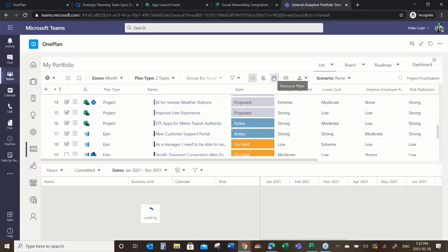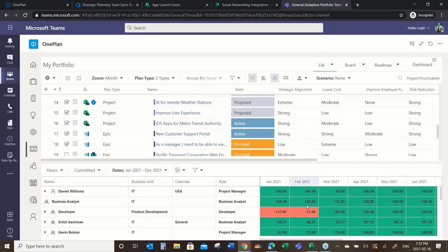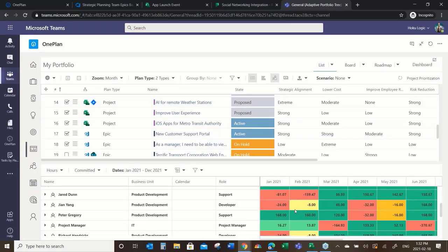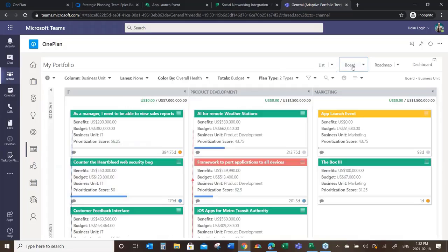Likewise, I could look at this through that resourcing lens and start to make changes to the projects that I'm including to try and get rid of some of this red or shift projects out, shift timelines, and do that type of prioritization because I'm looking at this resource pool centrally and not set up in those different product environments to try and make sense of it. We are managing our resources centrally against the capacity of the organization. That's a conventional prioritization.